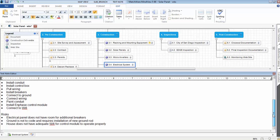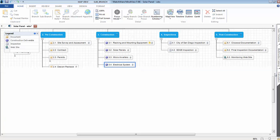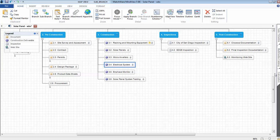And there were some risks also. If the panel was not large enough, we need to install the additional breakers. You may need a new panel. If the ground is not to code, then you would have to install a new ground rod. I believe they have to go about 8 to 10 feet into the ground. And then finally, if your house doesn't have sufficient Wi-Fi connection, that will create some issues when you go to connect the system and access it via the web.